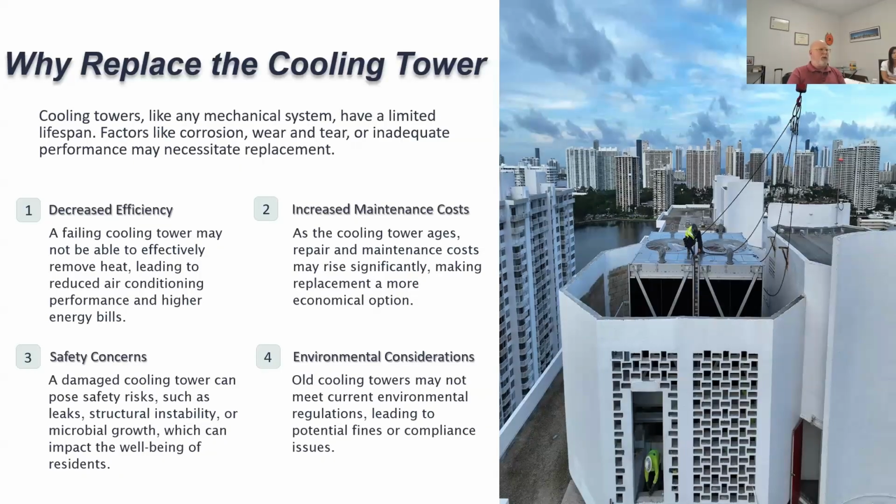So the biggest question of all, why replace the cooling tower? The older towers, there's a couple of things. One, some of the larger towers can be rebuilt in place. Some of the very, very large towers, sometimes the only option that we do have is basically rebuilding in place. That is a very, very lengthy process typically, and usually you're without sections of the tower. So those are going to be winter jobs that we do.